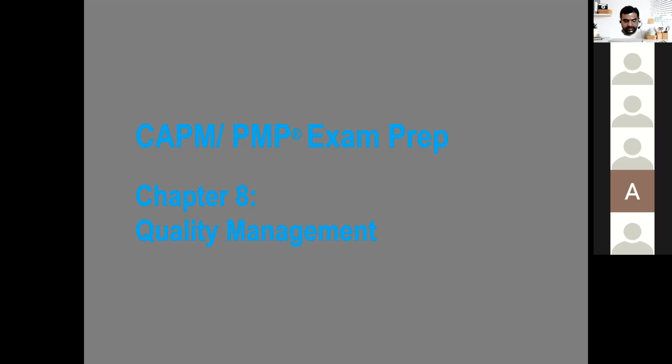If you remember, guys, we talked about our different baselines, and those were the scope, schedule, and cost baselines. And then we said that in total, they are called the performance measurement baseline. So the performance measurement baseline (PMB) is an integrated version of the cost, schedule, and scope baselines.